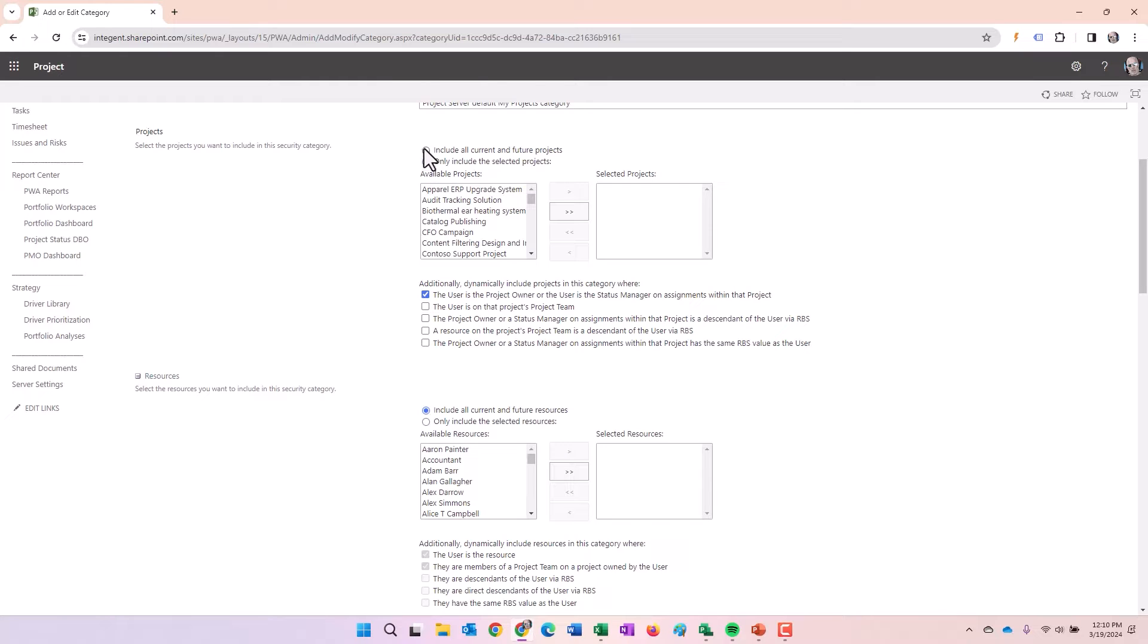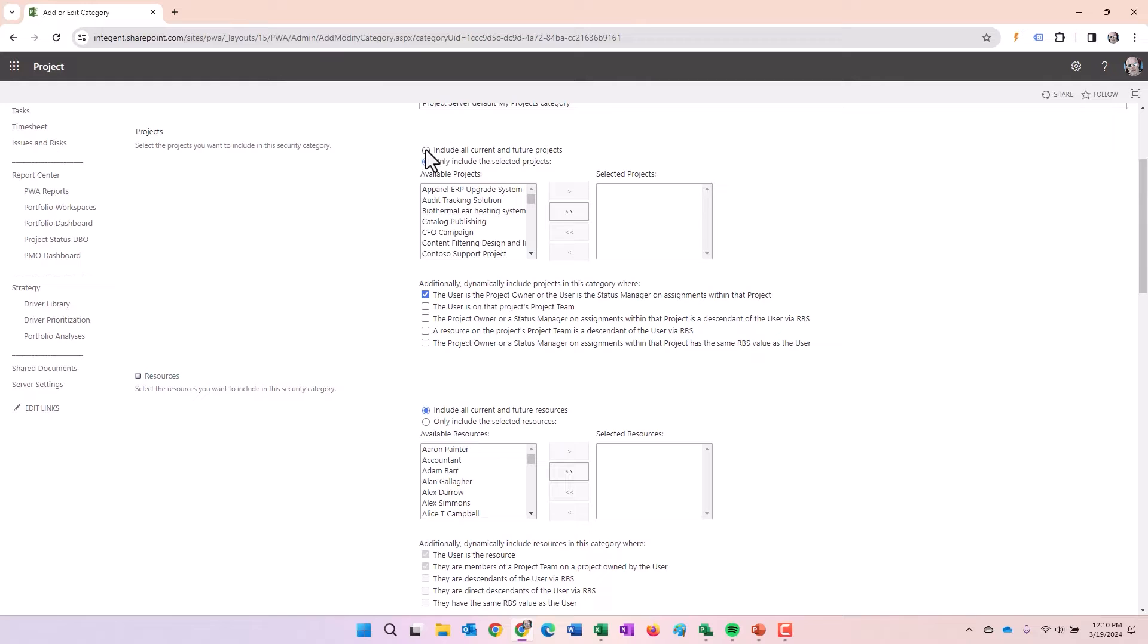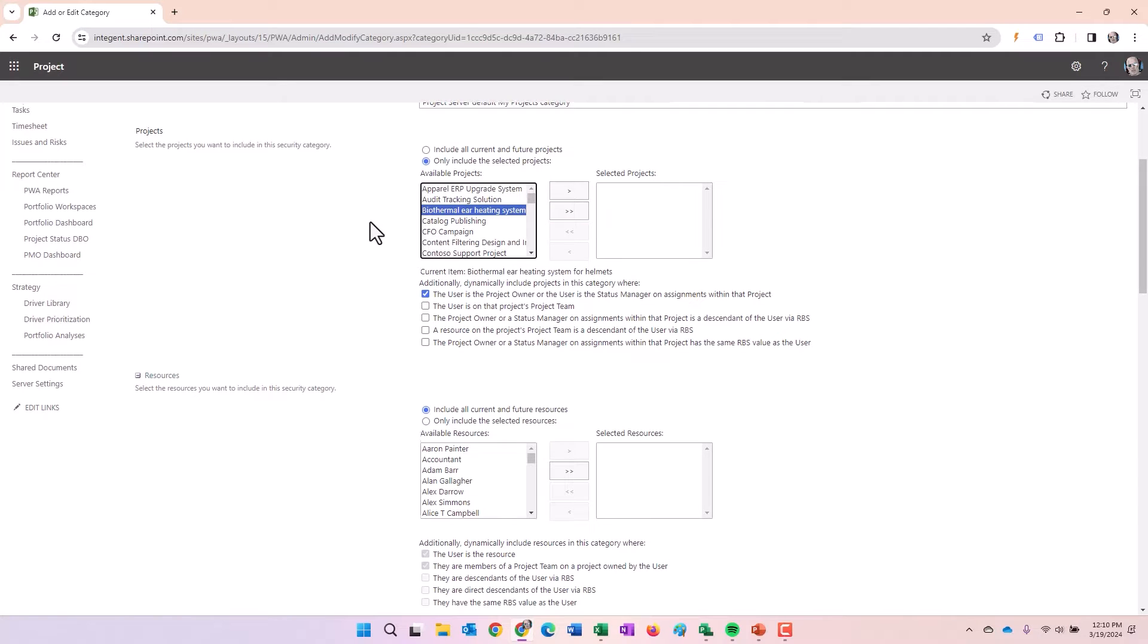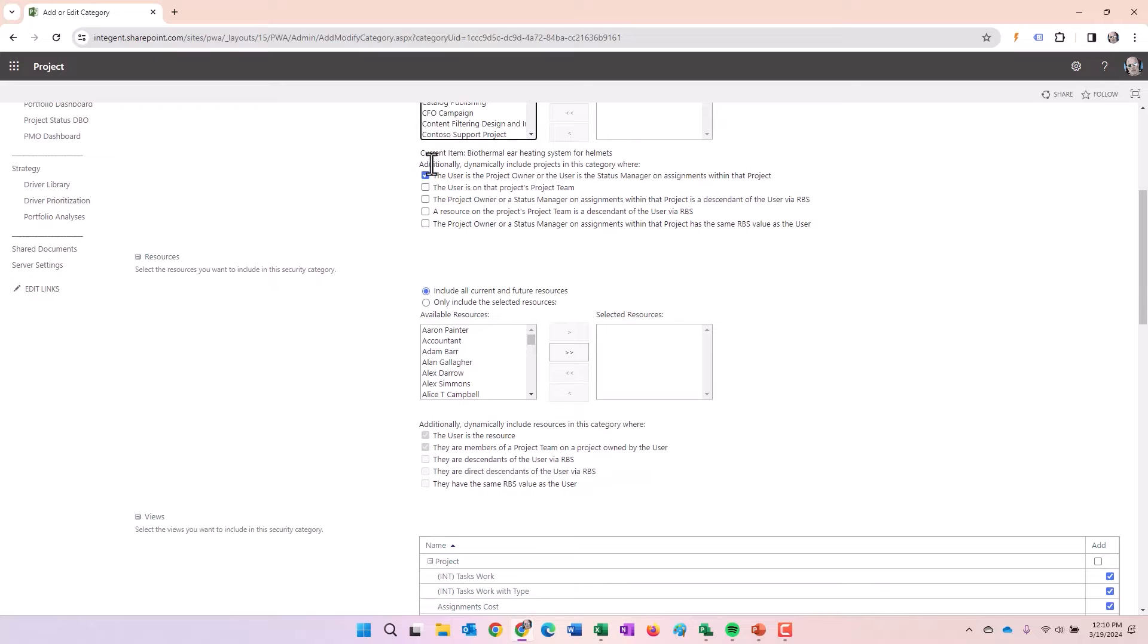First option, radio button option, is include all projects or include a selected projects. When you have the first one selected, it's pretty obvious. You're going to see every project within the system. The second you determine based on either manually adding items, select them here, click an arrow, add them to the box on the right, or you use a combination of the checkboxes below.